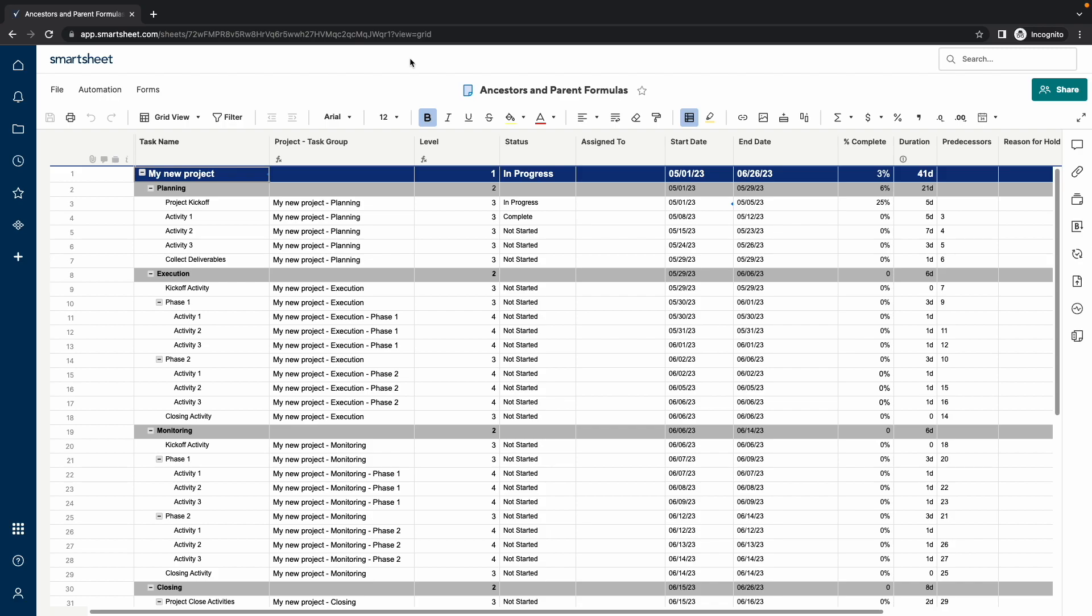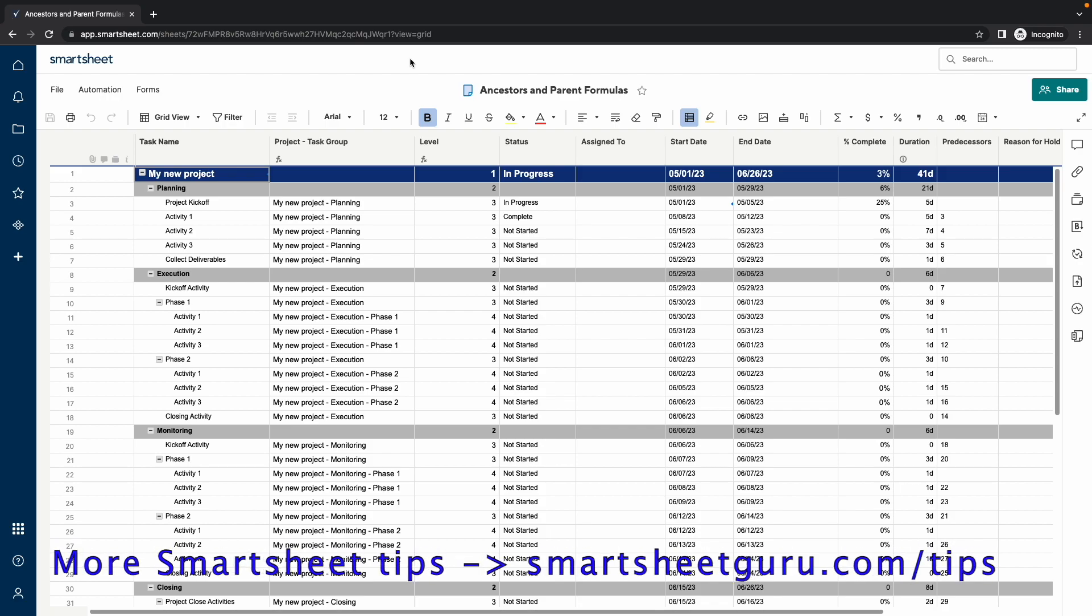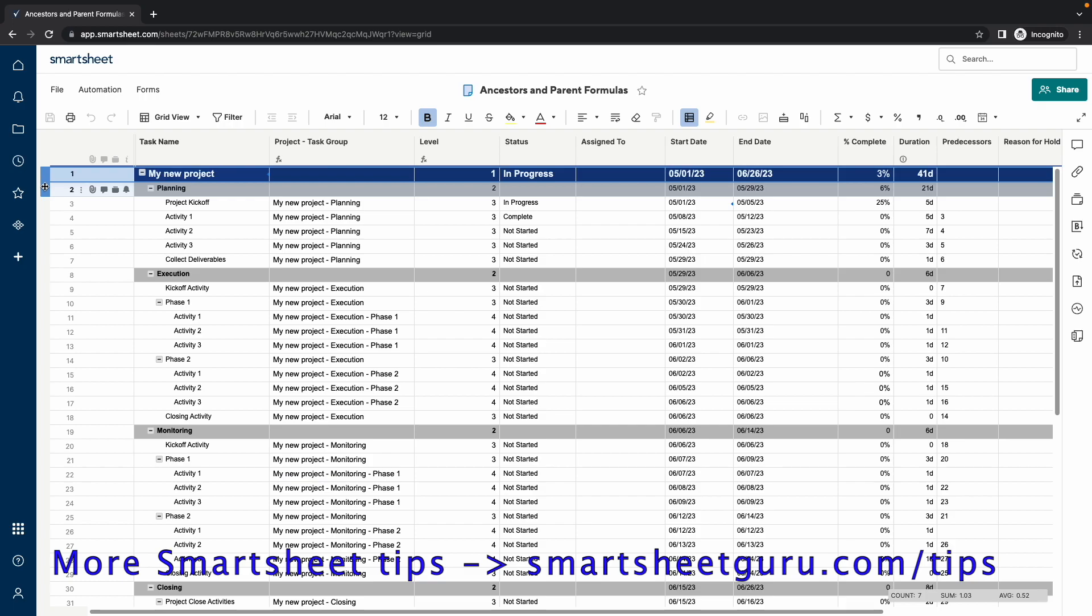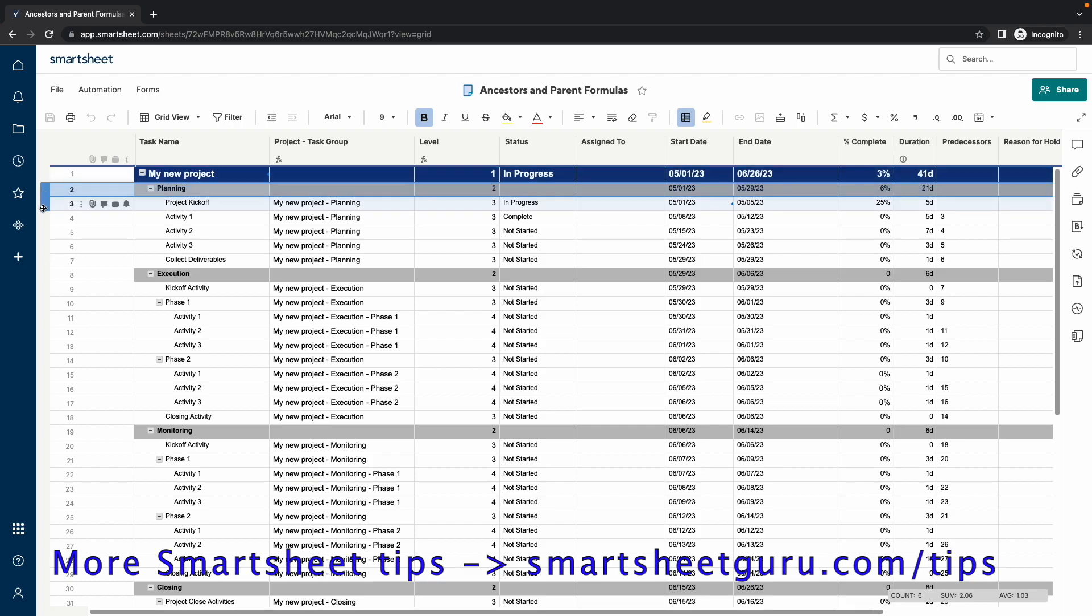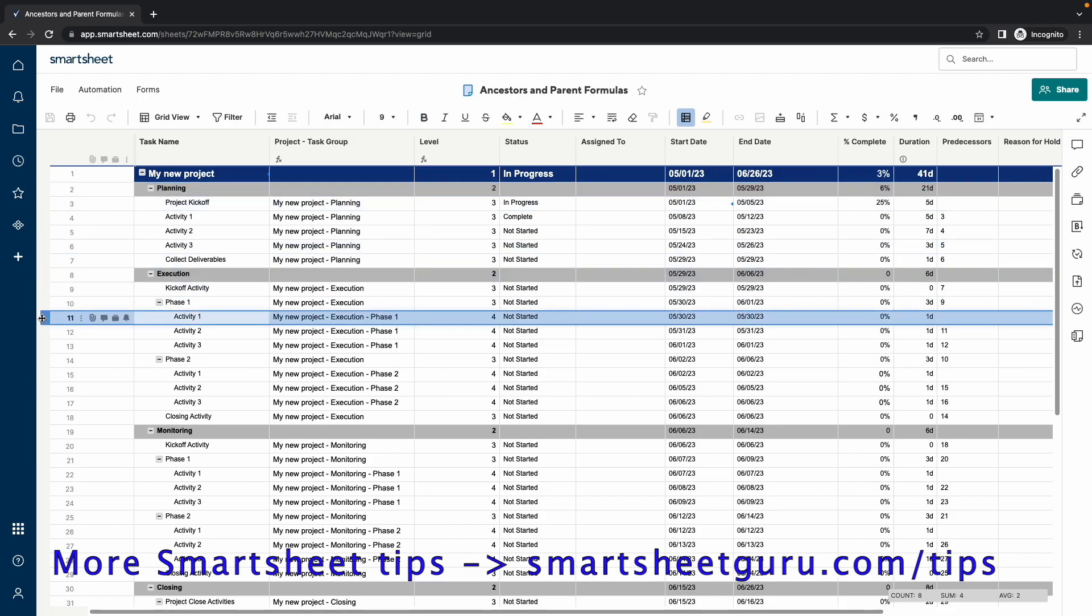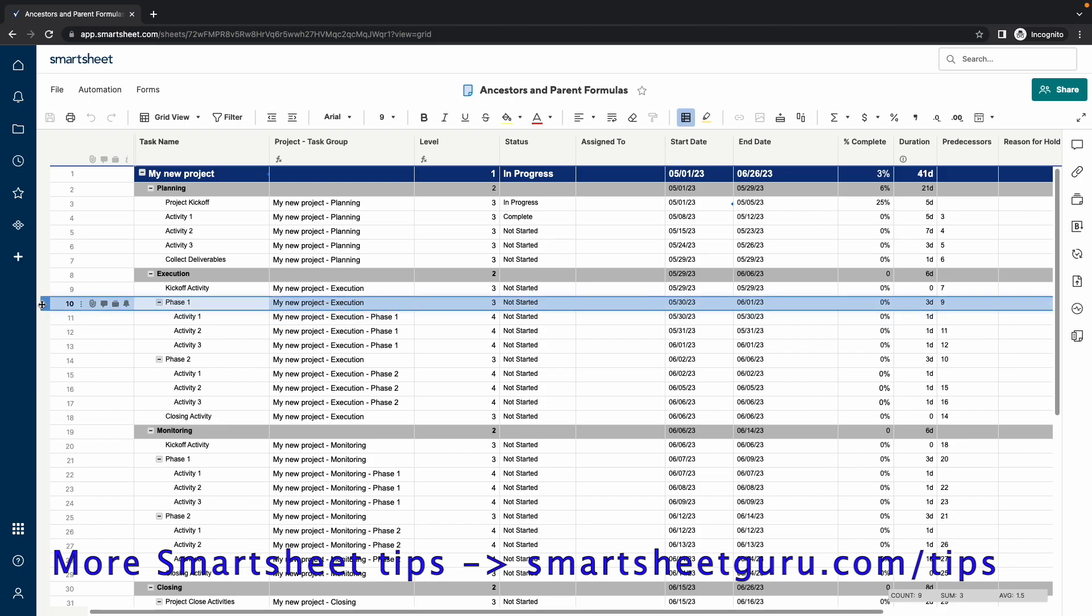I have a project plan here with several levels of hierarchy. Level 1 is the very first row and shows project level information. Level 2 contains subheadings with groups of tasks. Level 3 contains the tasks under the subheadings. And Level 4 contains groups of tasks that are grouped into phases.